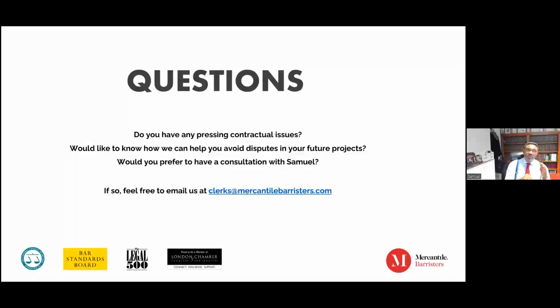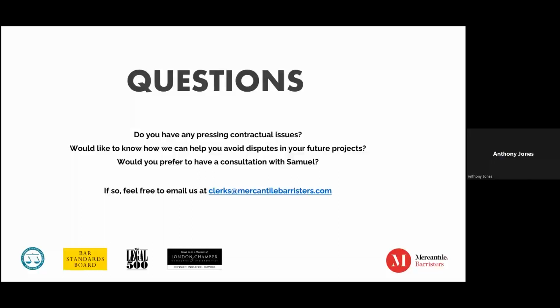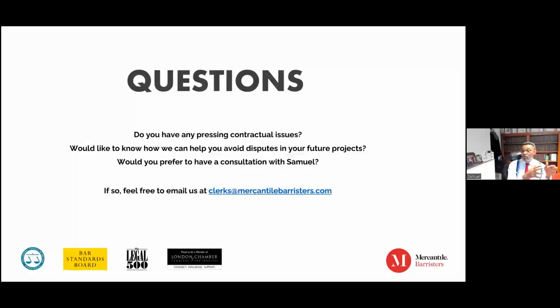Now, if the site is not due to receive your components and they're trying to force you in, if I were in your shoes, 2 weeks before I'm due to start, I want to pay a visit to site. And you need photographic evidence with your mobile phone, saying, look, here is the structure, this is the opening in which I'm supposed to fit my components, they're not ready, or the tolerances are not there. Now, what are you, principal contractor, going to do to ensure that this happens? And that is the time that you serve the notice whether or not you are able to come and fit.